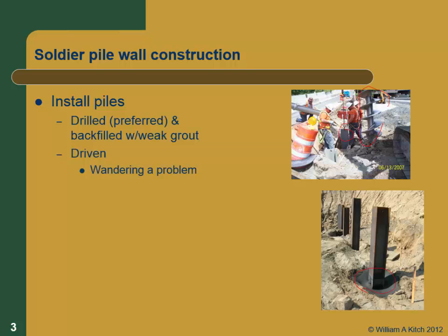The other way to do it is to drive the piles. The issue with driving the piles is they're not going to be straight. They might be pretty straight. They might not be very straight at all. I've seen some really interesting pictures of driven piles in braced excavations where the piles actually twist and turn 90 degrees, so the high modulus section of the pile is actually in the wrong direction. So driving can be a problem, but on the other hand, there's places where if you're in cohesionless materials and you can't hold a hole open, you can't drill them anyway. So you can drive them, but if you can afford to, and the materials will allow you to, it's much better to drill them.